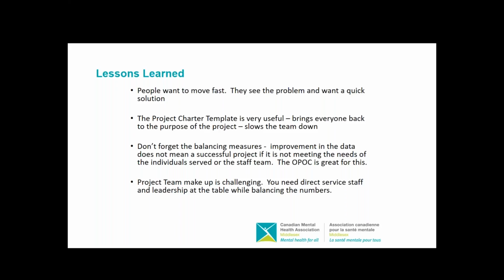As the programs began to use the tool, they were finding out what flow worked better in their program area and requesting additional people have access to be able to enter the data or to be able to create the keys as we implemented it. So we had this thought in our head about how it would work, but reality actually changed that. So you need to be open to being flexible with that, adding people, and really listening to each different program area for what's going to work for them.